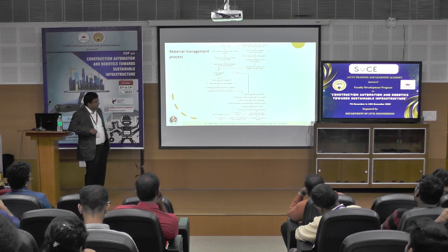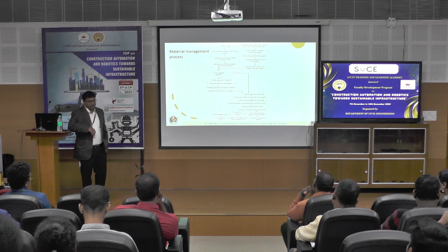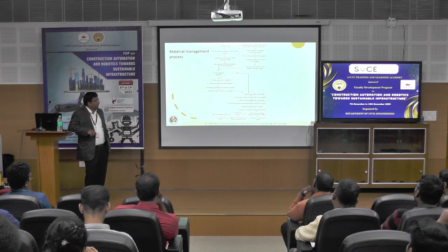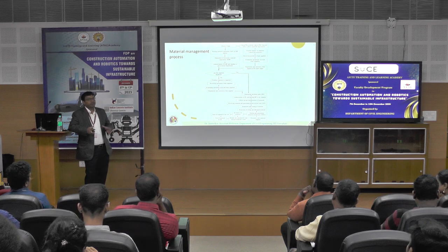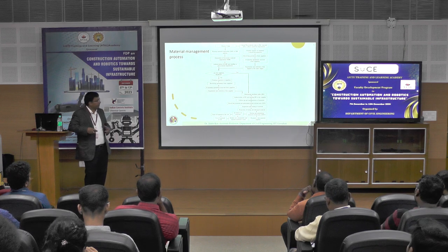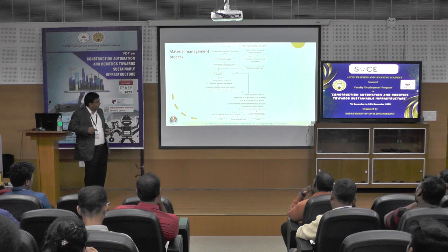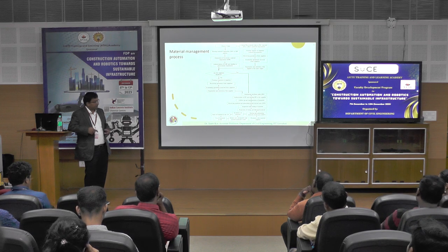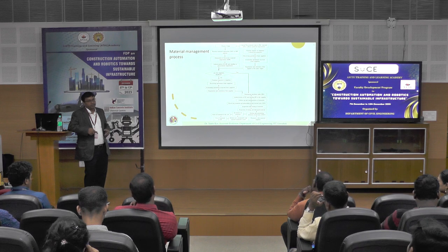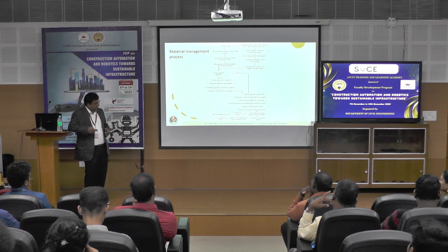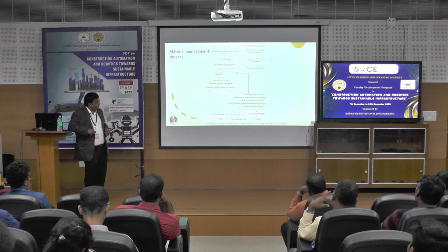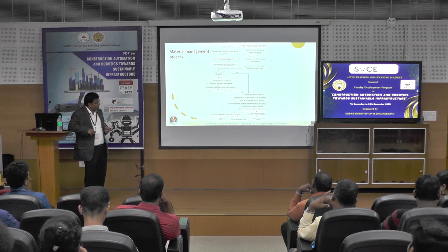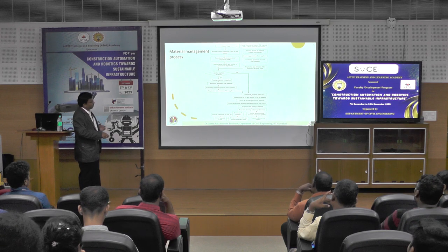The supplier then delivers the material, and follow-up and transportation take place. Once material is received at the site, a Goods Inward Note, or GIN, is generated, indicating that the material is now inventory. Following GIN, inspection and testing of materials takes place. Materials found damaged are rejected and the supplier is asked to replace them. Wrong or damaged materials are rejected, and quality materials that pass inspection are stored.